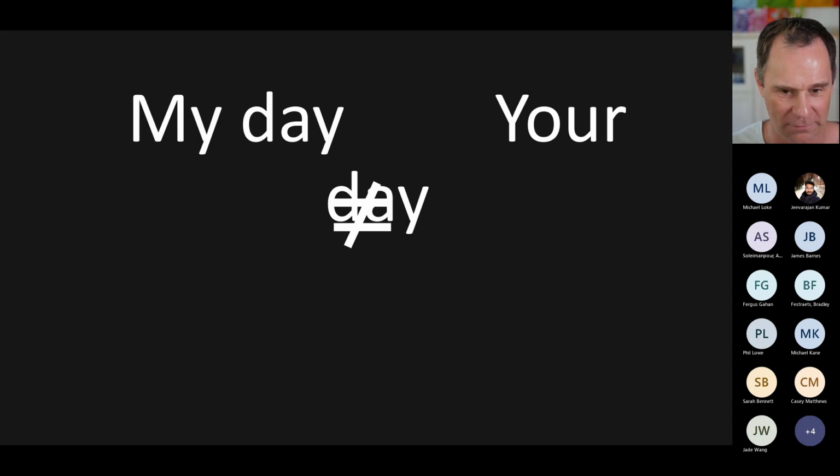I don't know if you've ever had someone like Rami on your team, but Rami is a developer extraordinaire, and he can get way more done in a day than I can. So if Rami estimates it's going to take 8 hours, but I'm the one who ends up picking up that piece of work, well, I can't get it done in 8 hours. His day is not the same as my day. And so, 2 weeks later, I rock up and the thing is built. Our estimates are shot at that point.